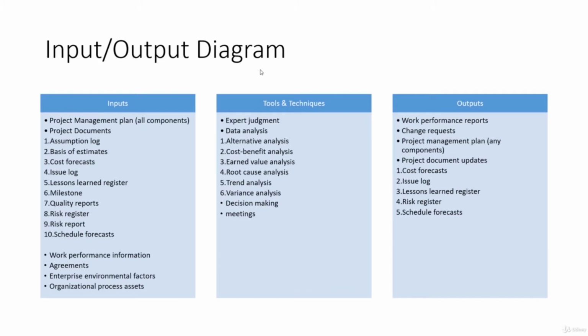Cost forecasting is a standard procedure used by many companies in their technology divisions. In fact, in many other divisions, basically it's like having a tolerance limit based on past experience, and you evaluate the performance of the current project to determine if this project is going within that tolerance limit. So it's very important to make sure that we don't overspend on the projects, and cost forecasting helps in that.